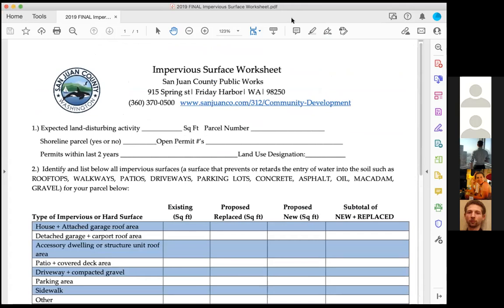And I also encourage everybody, if you're hired by a local community group to do this, one of the first things I encourage people to do is probably the same you would do as if you were hired to do just a single family residential. Make your appointment and make sure you do your pre-permit appointment with the building department.